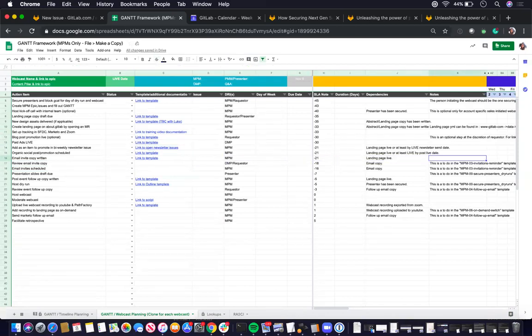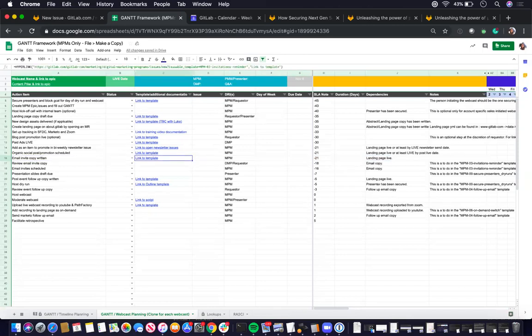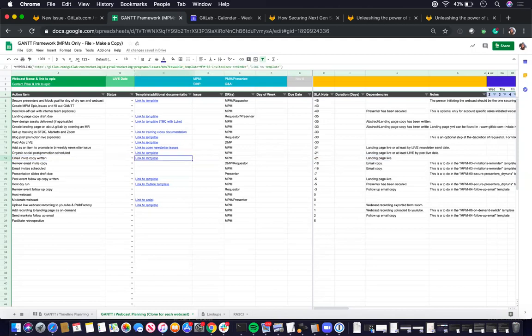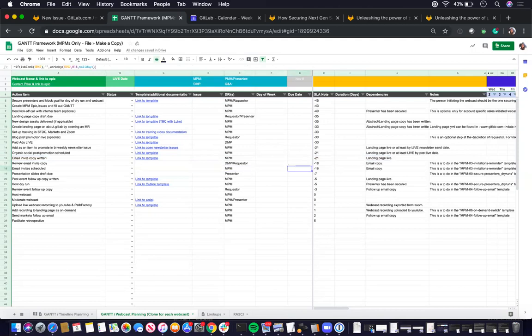So what I do is I usually just link it to, in the template itself, I will link it to the initial task that was due. So the email copywritten and then in the email invite schedule, I just noted in the notes that this is to do within the MPM-03 invitation reminder issue template.